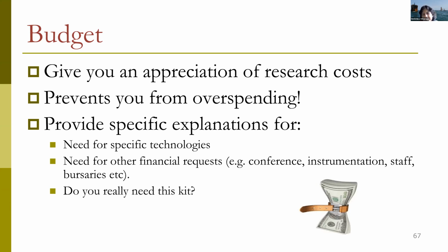In this kind of a juncture, it's very hard for us to have an estimated budget that is very well understood, but still you need to keep like 30% variability, 30% deviation, and include the budget with 30% plus on the expenses.